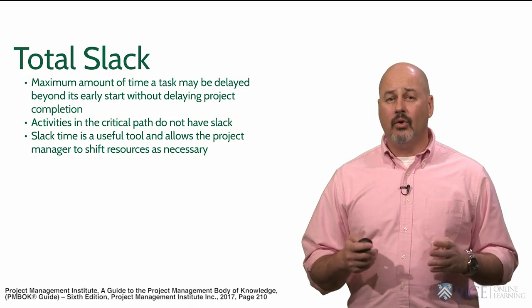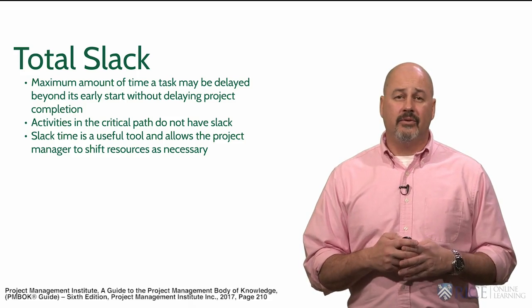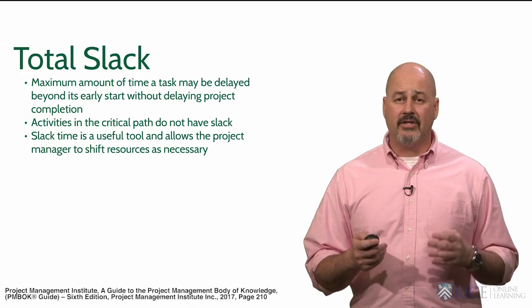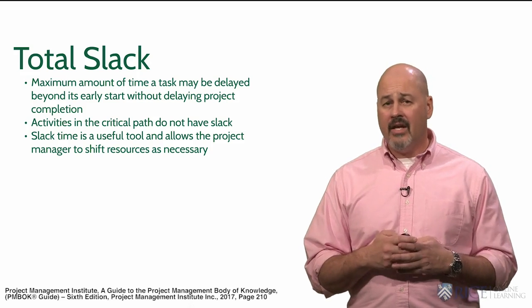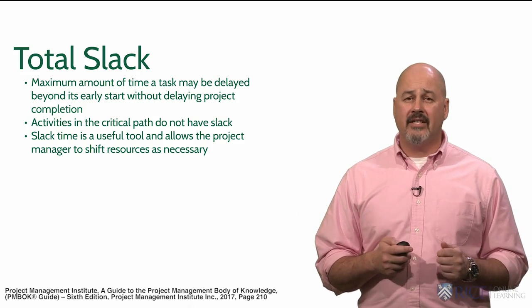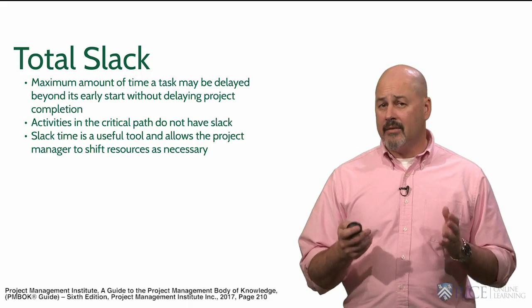This is a useful tool that a project manager has, and it allows you the possibility of shifting resources temporarily to assist another part of the project that may be falling behind. It's extremely valuable and shouldn't be wasted. Tasks or activities in the critical path will not have slack, so this is something that you need to keep in mind.